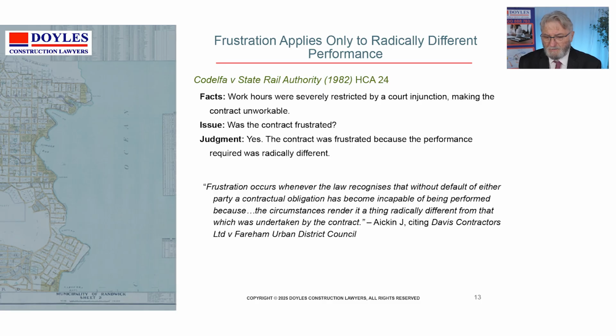It expected that it would be able to work 24/7. So it priced it and resourced it on the basis that it could do that sort of heavy load. However, after it started, the adjacent residents who were concerned at their noise level took out an injunction to stop them working more than 12 hours a day. As a result of that, the court, and it was the High Court of Australia, decided that frustration had occurred. The whole basis of the contract was significantly changed, and the contract was frustrated.